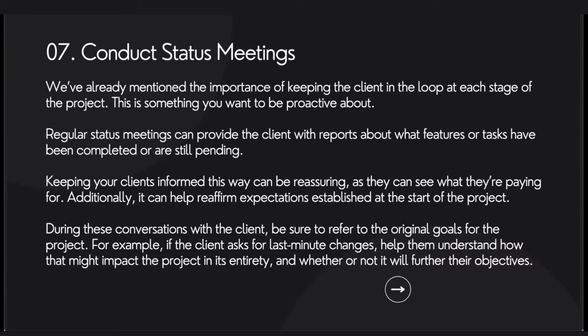So when the reports are available on a monthly basis, it's great for you to sit with the client and show them that you actually care. Reaffirm the expectations established at the start of the project. Hey, here are the deliverables. Because when we provide you with the reports, you're going to have an activity sheet that's provided to you, where it shows you exactly what we've done, what's pending, what hasn't been done, what your client owes us, what they don't owe us.